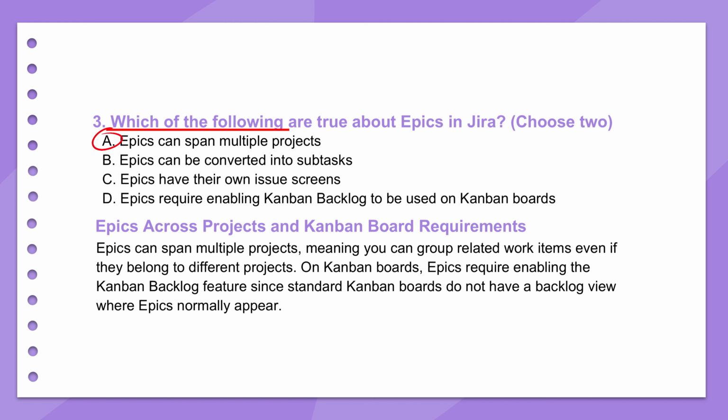Okay. What else about epics, particularly, say, on Kanban boards? Yeah, good point. If you want to properly manage and visualize your epics in a Kanban backlog, treat them like backlog items themselves, you need to make sure the Kanban backlog feature is actually enabled for that board. So it's an extra step for Kanban users. It is. Otherwise, they don't quite integrate into that Kanban column flow in the same way.